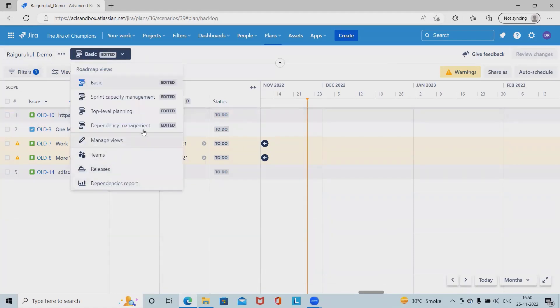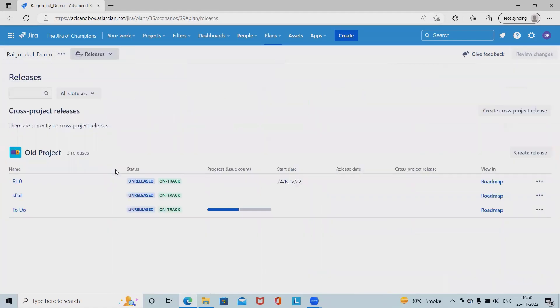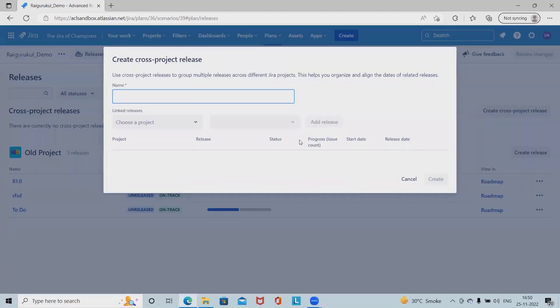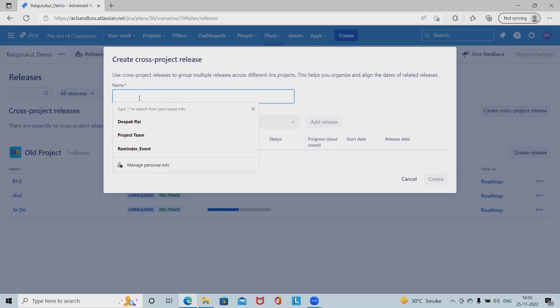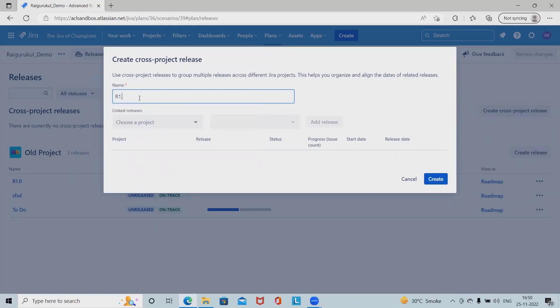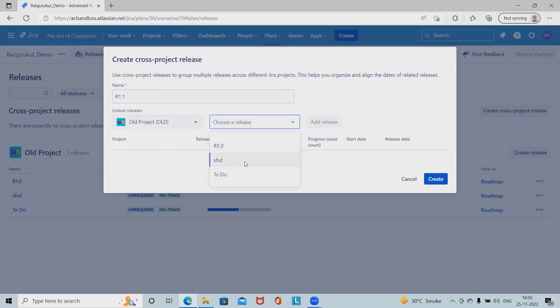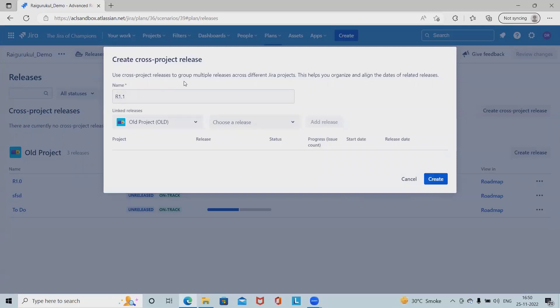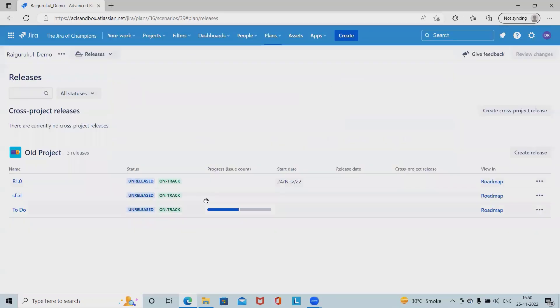For cross project detail releases, we can create it from here. We have to define the release name, so R 1.1 is my cross project release. We have to select the multiple projects whichever we're looking for. Once we click on release, this release will be added successfully. Click on create and we have created cross project releases to group multiple releases across different Jira projects. This is helpful for clubbing multiple release versions into one bigger group so that we can track it easily.